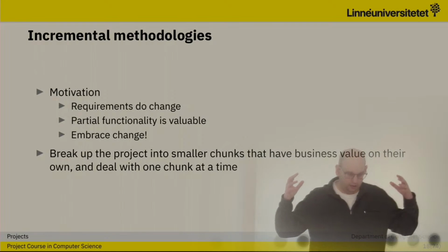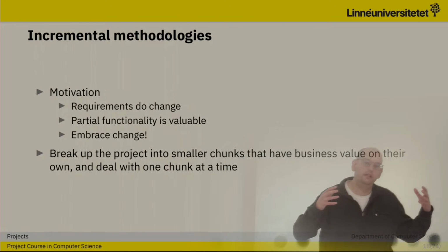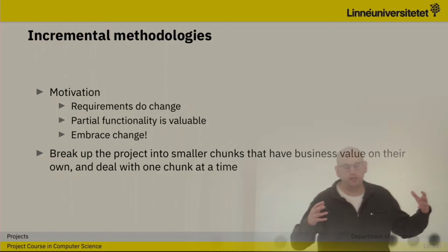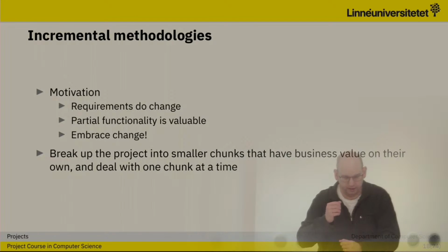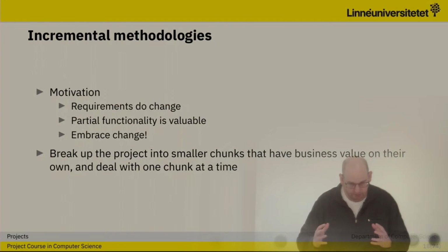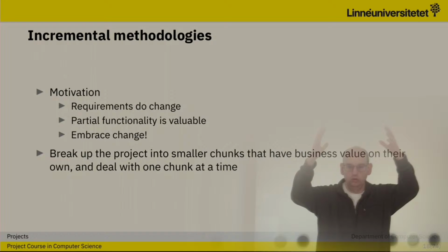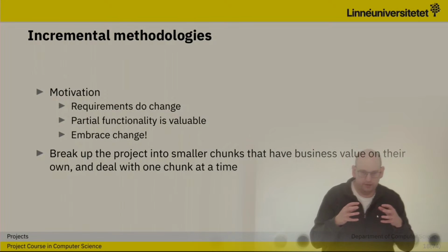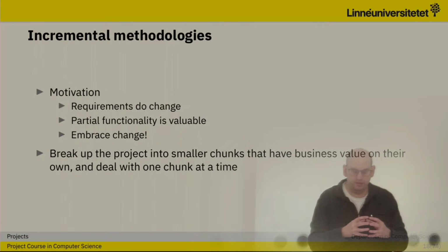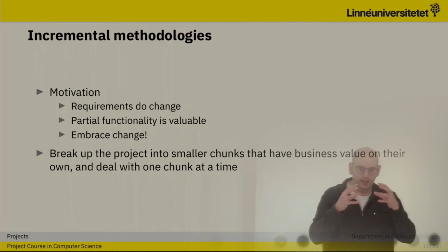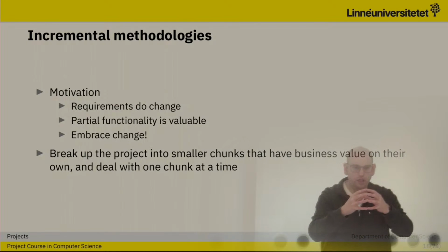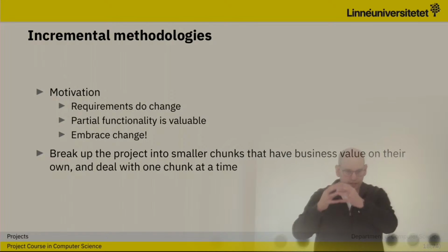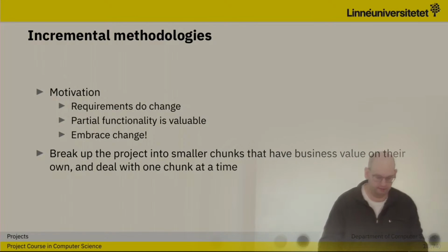Instead of like we do in iterative development, where we start working on the project and build it up as a whole, in incremental methodologies we rather take the parts and build this part, a chunk with a business value, and we create another chunk with a business value, and then another chunk with a business value.